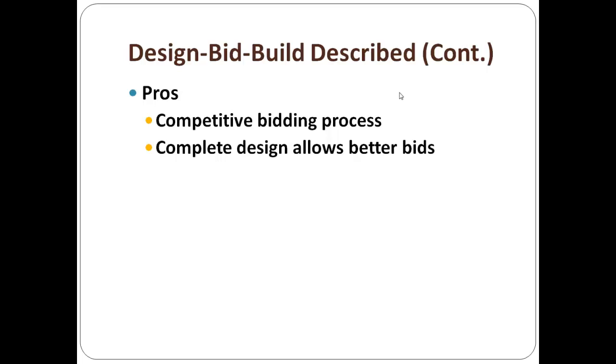He has his select group of subcontractors, mechanical, electrical, plumbing, site work and so forth. He'll take the set of plans that your architect has designed, stamped, and gotten approved, and they're ready to put out to bid. The general contractor will take that set of plans and go to his subcontractors and give them the portion of the plan that directly involves their part. They give him a price, knowing that they're going to probably win the job from the general contractor and be able to do their part of the project.